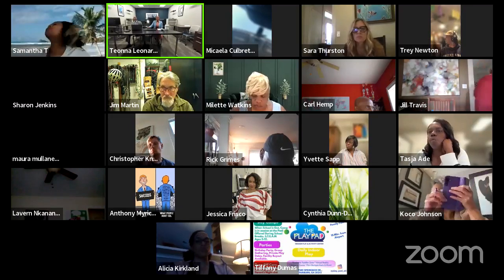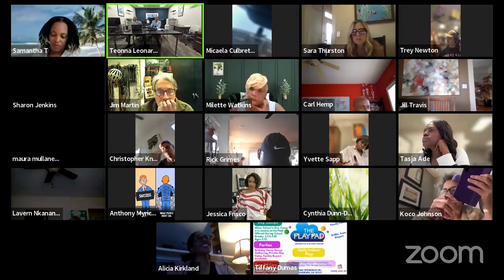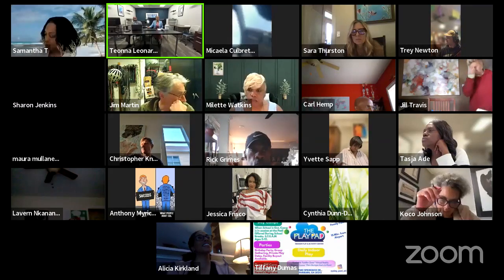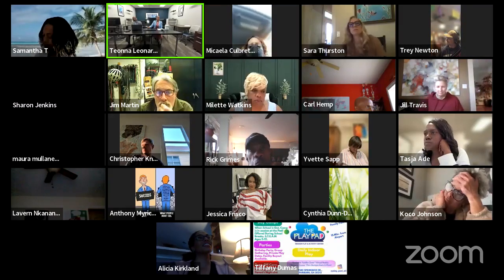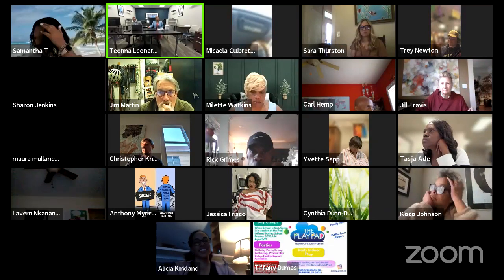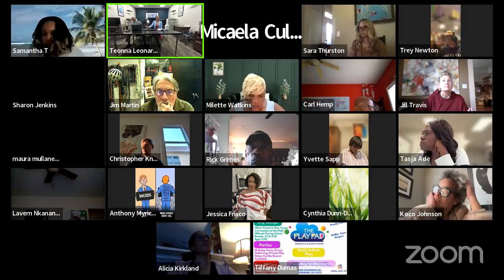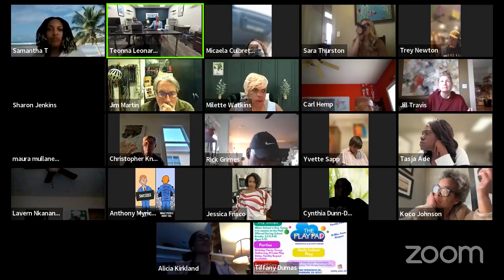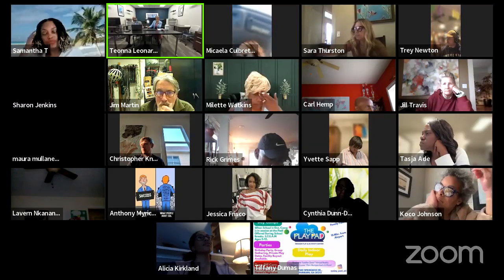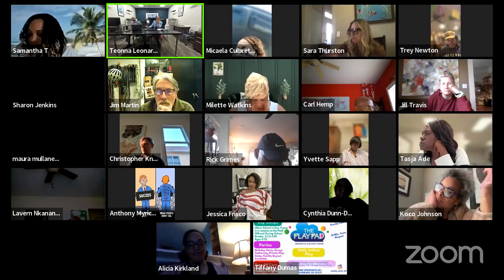Okay, so to answer your question, to find the historic district, you can go on the city's website and check your zoning through the GIS. There's also a portal on Accela, on the city's website, that allows you to find out what the zoning of your property is. If it begins with an HC, that's a historic district, or an LD, that's a landmark district. And the office is the Office of Design.